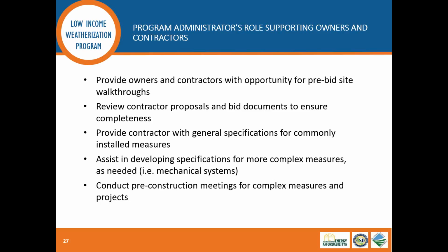We will, on behalf of the owner, review those proposals to make sure that everything the contractor is providing in that scope of work aligns with what our expectations were, and that way we can minimize any change orders or anything that's unexpected down the road, and really have a nice, clean, straightforward project, at least as best as possible.